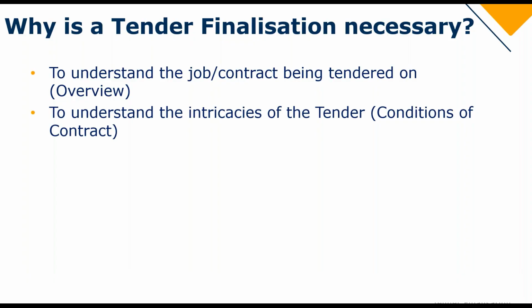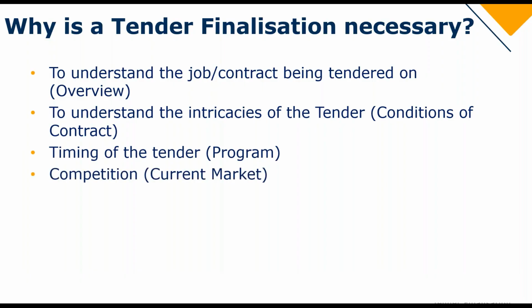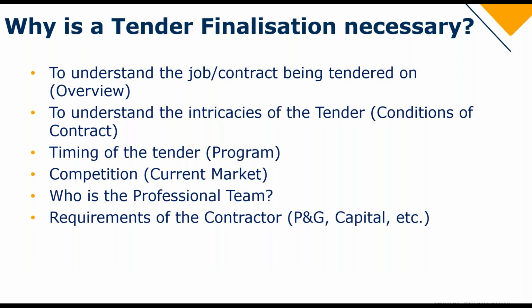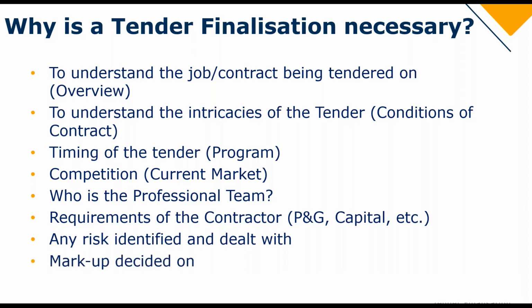To understand the intricacies of the tender, the conditions of contracts, the timing of the tender, the program, the current market, so obviously any competition, who is the professional team, what are the requirements of the contractor, might be PNG requirements or capital requirements. Any risks are identified and dealt with. And lastly, the markup gets decided on.